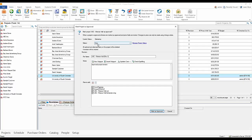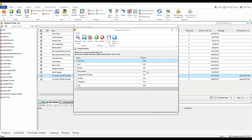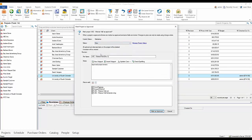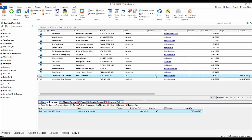We'll go ahead and approve the project. We offer to change your status to the first status in your list that is marked as a won state — as opposed to 'open' for estimating or 'lost.' You could skip directly to 'design' if you want. We're also going to create a revision of this — this is where revisions come into play. By marking this as approved, we take away the ability to manually create revisions after this. Everything has to go through an approved change order moving forward to become a revision. The text defaults to 'approved project revision.' I'll go ahead and mark this project as approved — a checkbox confirms it's been approved, and a revision has been created.